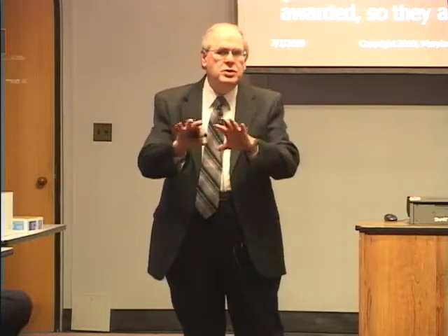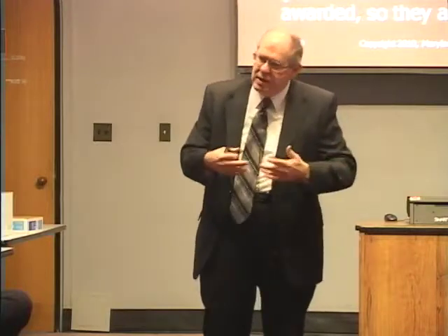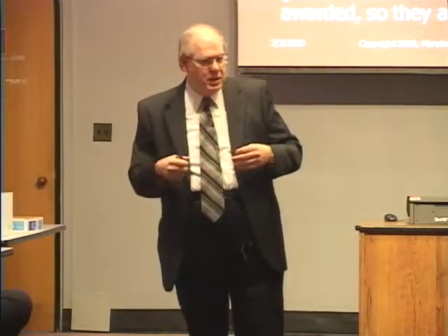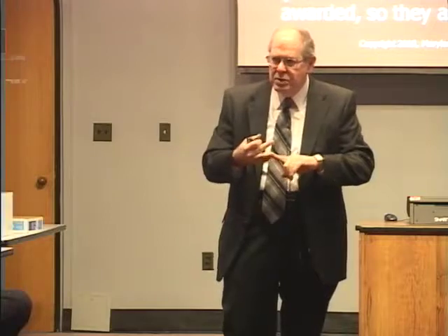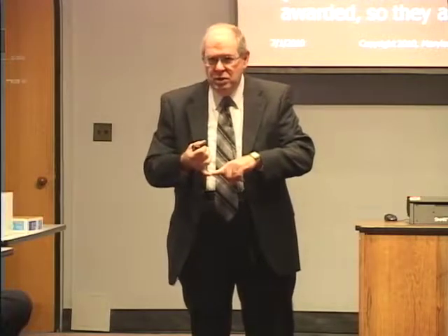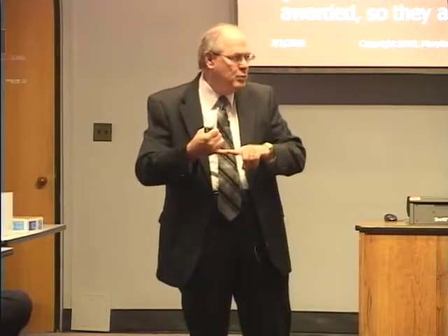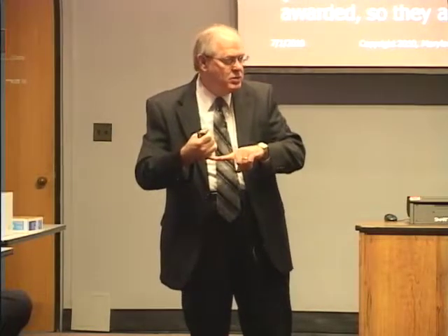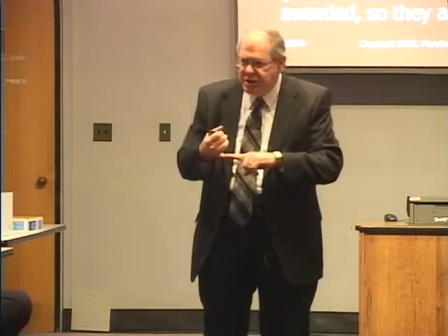And what this comes down to a lot of times is being a nice guy. Lots of times, if you're dealing with your vendor, the vendor will tell you, you don't have to copy our bonding company or anyone like that, right? You won't do that because that'll be a little bit sticky and we just really prefer you didn't. And if you go ahead and don't do that, it can come down to the point that what we thought we had, we don't have. We don't have the assurance that's provided by the bond. And that's doubly bad because bonds cost money, and that money is tacked on to what a vendor is charging you. So if you abrogate the bond by your lack of action, you've still paid the money for the contractor to pay for that bond, but you're getting none of the safeguards from the bond being in place.